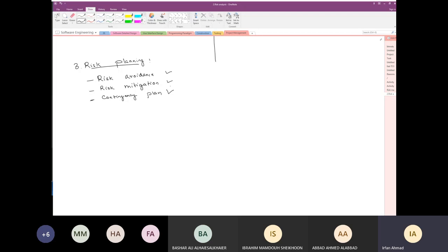Okay, I have an important modeling team member and I know he's not happy with the company for some reasons and he's going to leave. So of course, the avoidance strategy is to deal with this and speak to him, for example, see what is making him not motivated or what's making him not satisfied with the company. Try to deal with this so that that problem is gone. Maybe he's not happy with the salary, right? He believes that he's not paid enough or he's not paid fairly. So risk avoidance would be, yeah, we discuss with him and we see what makes it reasonable, and we take steps so that we can resolve it. We pay him the right salary, and in that case the risk is avoided completely.